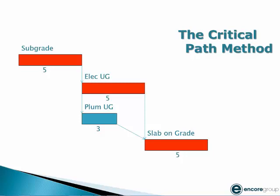This is an example of a sequence of activities where a critical path is identifiable. You can see in this example the sequence from subgrade through the electrical and plumbing underground and the slab on grade. The red items are obviously critical, and you can see the plumber has two days of float. Understanding the float and who owns the float is one of the most important parts of a construction scheduling task.